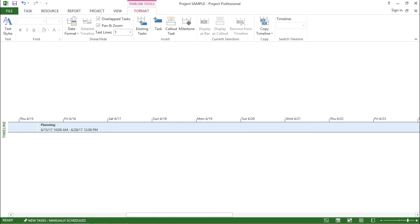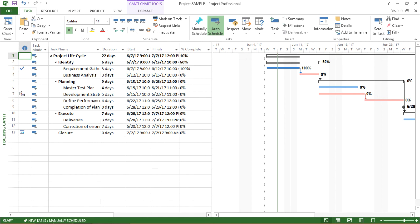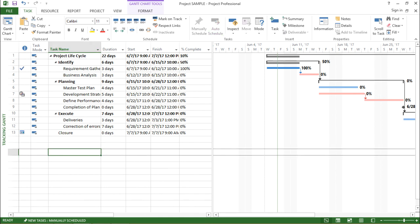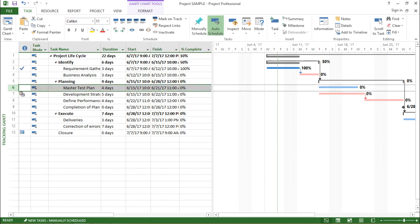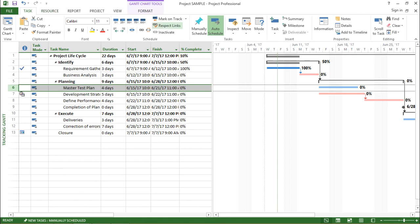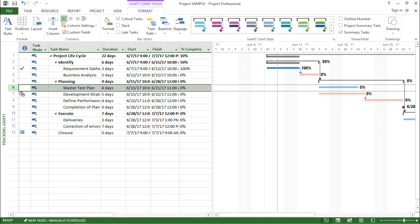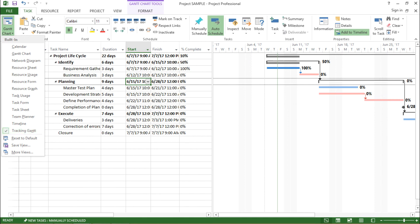Alright, so that was about the detail timeline view. Moving on with my next view, that is the tracking Gantt. Let me click on tracking Gantt. Now the tracking Gantt is a little bit familiar — I can see the table on the left and the Gantt chart view on the right — but the key difference is that I can see the percentage of work complete for each and every task, the critical tasks as well as non-critical tasks, and the amount of work they have finished so far.